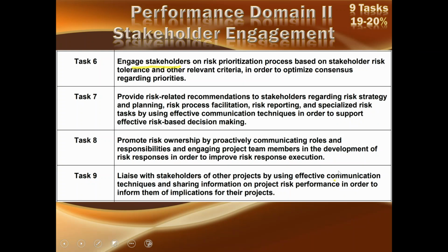Just a minute. Okay, while we are doing the risk prioritization process based on the same stakeholder risk tolerance which we have established already and other relevant criteria, if any, in order to optimize the consensus regarding priorities. We cannot do the prioritization on our own. It is not the prioritization of the project manager. It is basically risk tolerance is for the stakeholder.